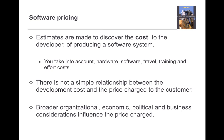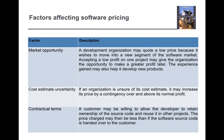Broader organizational, economic, political, and business considerations also influence the price charged. The first factor affecting software pricing is market opportunity. A development organization may quote a low price because it wishes to move into a new segment of the software market. For example, a company currently working on Java applications may want to move into Android/mobile app development, so it accepts Android projects at a lower price to gain market identity, and later increases prices to recover earlier losses.